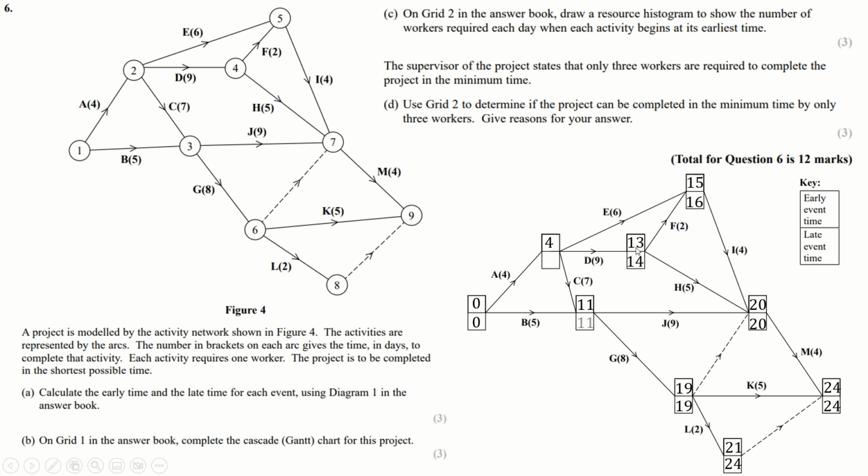And then from here, which is better, 16 take 2, or 20 take 5? 16 take 2 is lesser, so we'll go with that one. 14 take 9 is 5, 16 take 6 is 10, so we'll go with the 5 there. But actually, I already mentioned there should be 11 there, and then 11 take 7 is 4, so that actually gives you a 4 there. So again, just be careful to look through the whole thing and don't rush it. We'll end up with that. You can write down some working values if you want to as well, though I never bother.